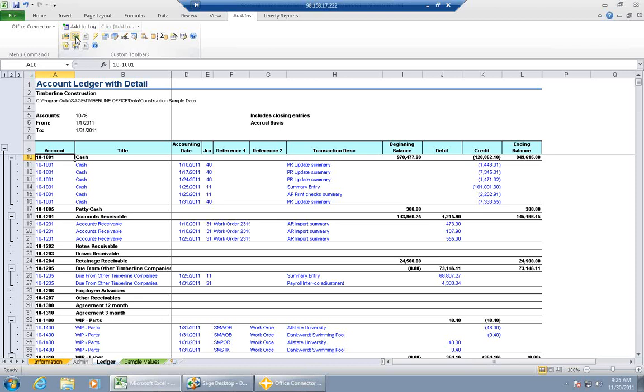For example, on the cost to complete worksheet that we looked at previously, had I saved that as values, I would have a static spreadsheet for a specific date, and I could keep a history of the job. I could have the spreadsheets all the way through on what the project managers had provided to me for numbers and where we were relative to total numbers on the job as of specific dates. So I can keep a history.